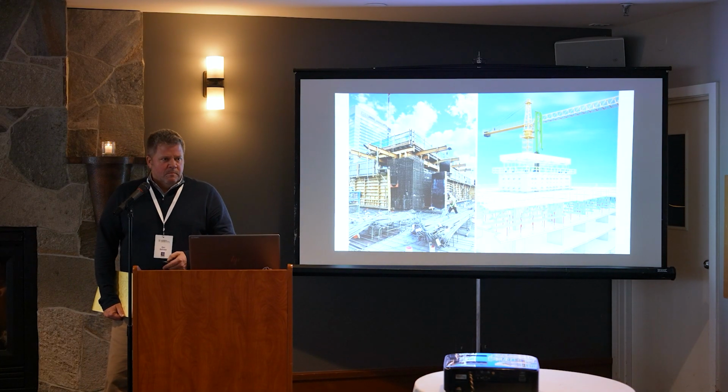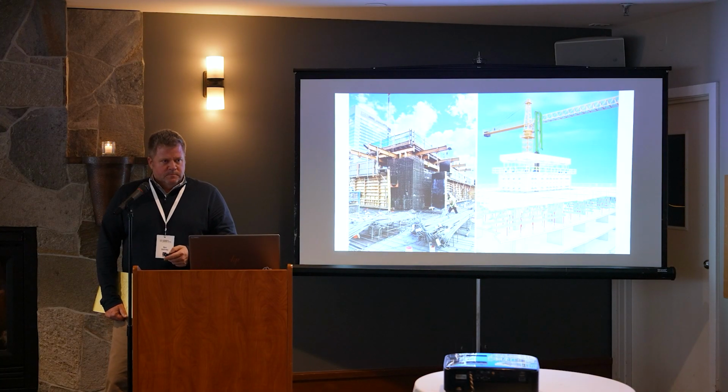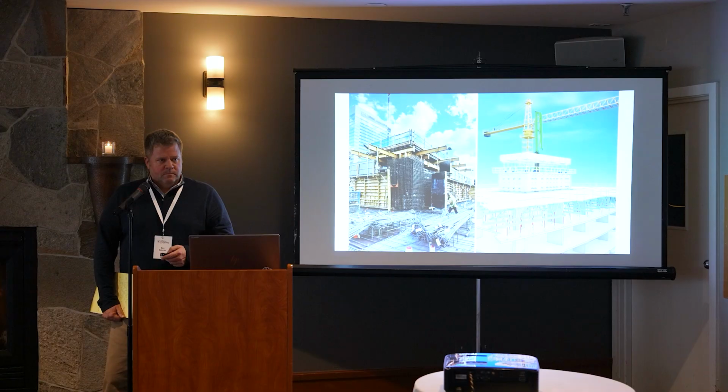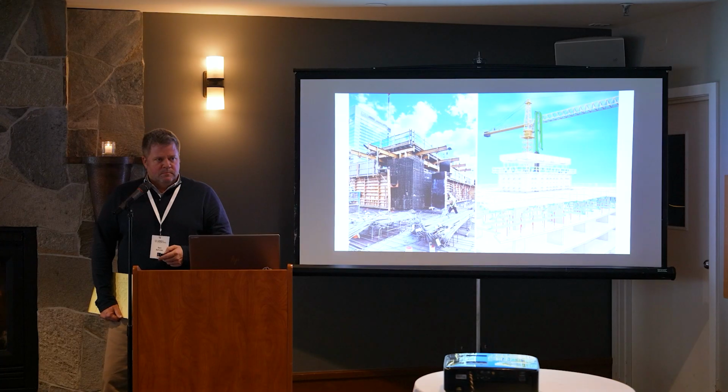And I'll speak on behalf of the GC, where I would love to have trade partner input, would be things like a crane plan, where I've got the site parameters and here's what the owners allow me to do. But for them to convey that message of here's the footprint, here's what it's going to affect, here's how long we're going to be here, and then also convey that to the rest of the subcontractors that are also fighting over the space. If they understand, it becomes a communication tool versus just a dictation of, you've got to move your stuff, cranes come in. Right. Thank you.